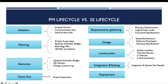Now if we want to align those phases, we notice that the initiation and planning phases cannot be completed before finishing the requirement gathering phase. Logically, the initiation phase aligns with requirement gathering. Similarly, we cannot develop a detailed project scope, baseline schedule, budget, or risk management plan before finishing the design phase — so planning aligns with design.